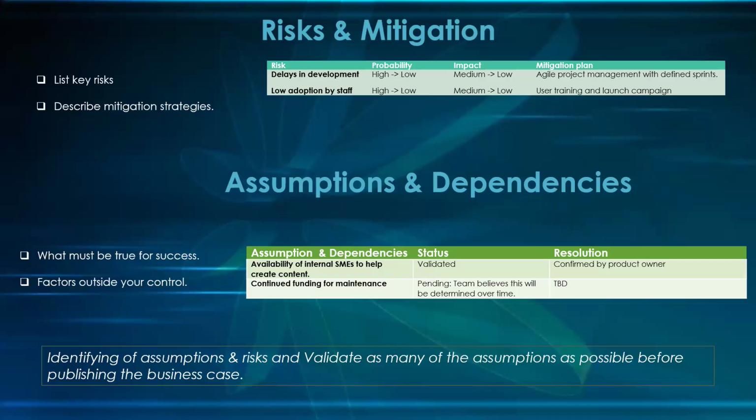You know what risk is? Then once you identify those risks, you also put a mitigation plan in place. It depends on your mitigation plan. You have to identify it, and you categorize it based on the probability and impact so that you understand the severity of the risk. Then you put a mitigation plan in place.